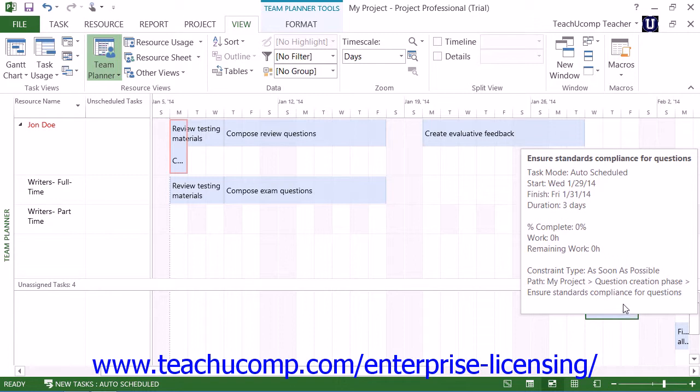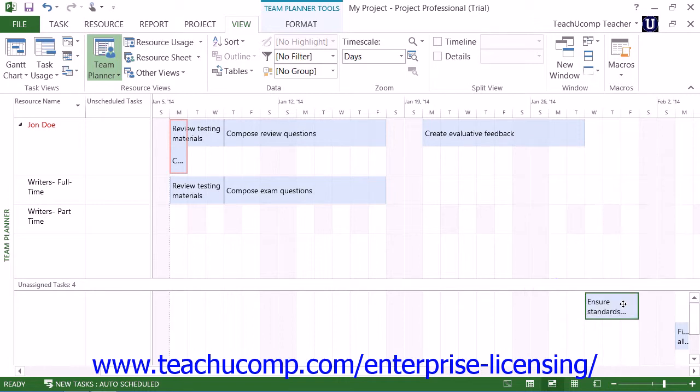As you assign and manage project tasks using this view, you will notice the colors of the tasks give indicators about the status of the tasks. Tasks that have actual work completed on them will show the actual work in a darker blue color. Uncompleted work is shown in a light blue color. Once a task is 100% complete, it cannot be moved within the Team Planner view.